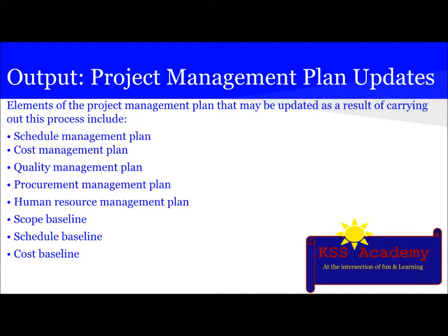The elements of the project management plan that may be updated as a result of carrying out the planned risk response include schedule management plan, cost management plan, quality management plan, procurement management plan, human resource management plan, scope baseline, schedule baseline, and cost baseline.